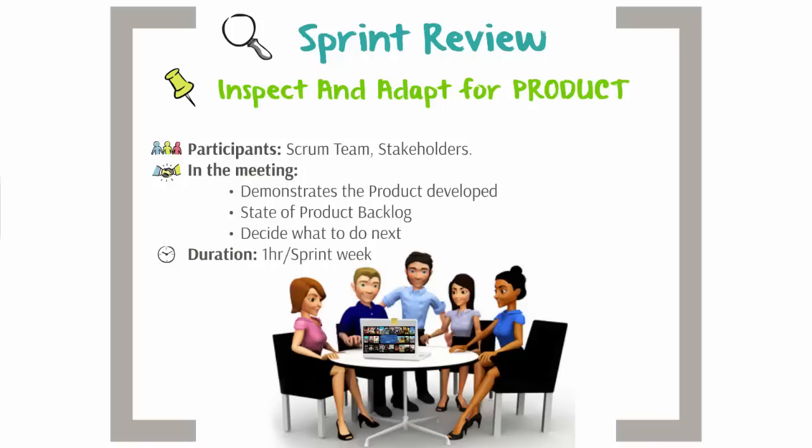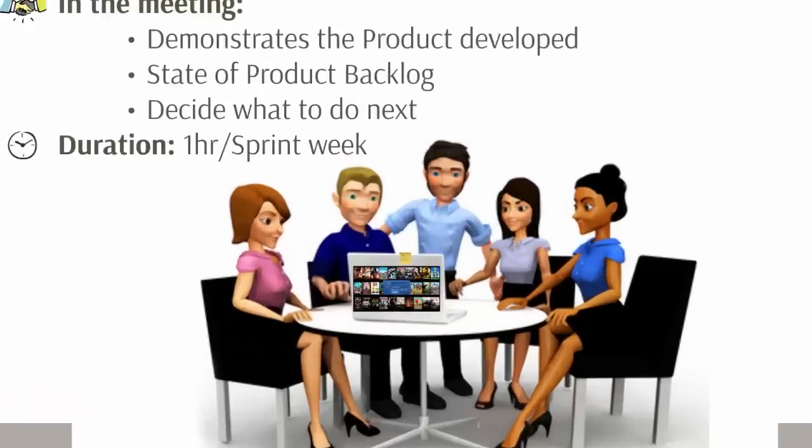This is an informal meeting, not a status meeting, and the presentation of the increment is intended to elicit feedback and foster collaboration. The sprint review meeting provides valuable input to subsequent sprint planning.